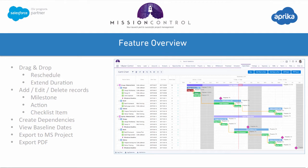It's feature rich in that you can drag and drop individual actions or a group of actions through the milestone. You can reschedule them, or you can extend the duration by moving the individual start and end days. You also have the ability to add, edit, and remove any milestone action or checklist item directly from the Gantt chart. You're able to quickly drag and drop to create dependencies between actions, and you're also able to view the baseline dates, allowing you to do an actual versus baseline comparison.